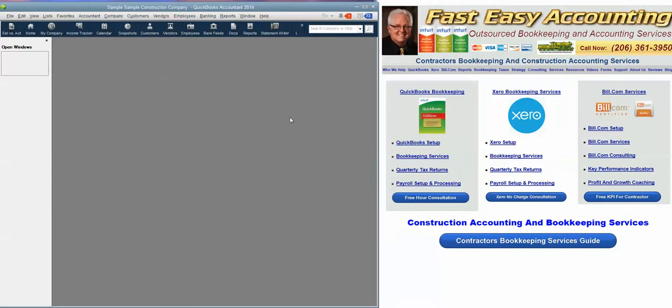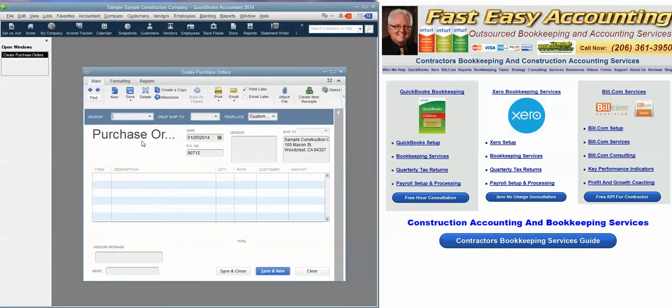And so essentially that's just a quick preview of how we track it for custom home builders, so that we don't overpay our subcontractors. Every subcontractor invoice has to be put in as a purchase order to be put in correctly. I'm not showing you all the detail here, I'm just giving you a quick overview. We have it all systemized in our system. We know how to put it in. We put it in as a purchase order, then we accept against the purchase order. If there's a change up or down, we put in a new purchase order. Everything goes to the purchase order system, and what that does is keep you, the builder, from overpaying. It also gives you great estimates versus actual reports.